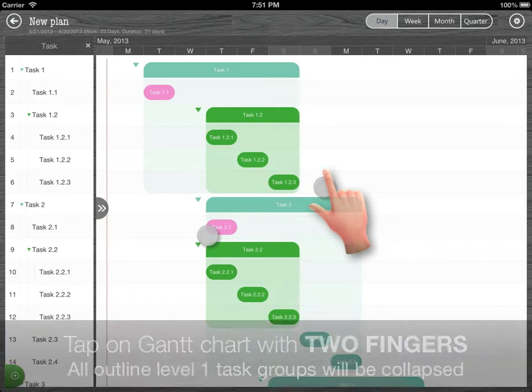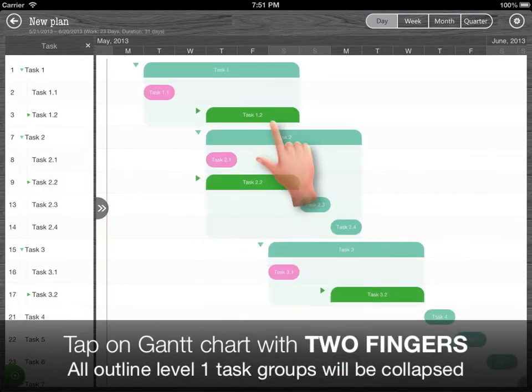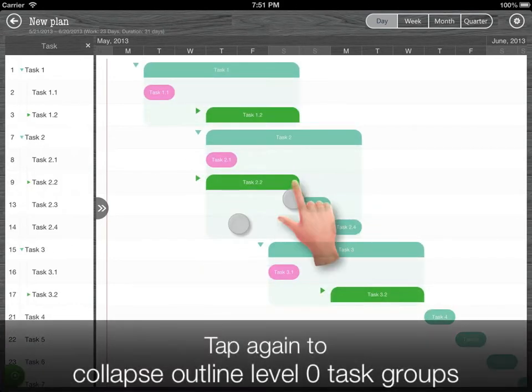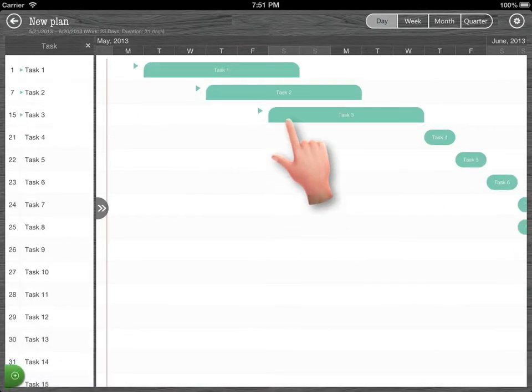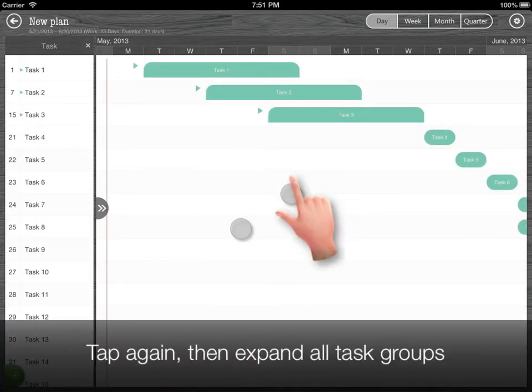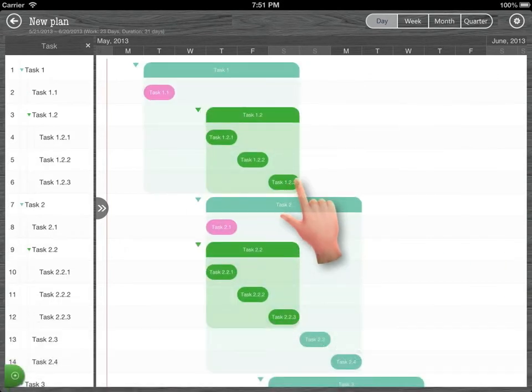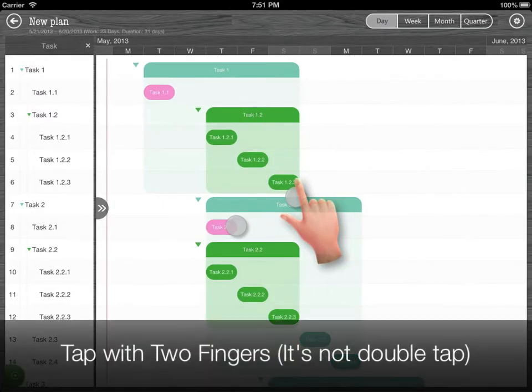Tap on the Gantt chart with two fingers, all outline level 1 groups will be collapsed. Tap again to collapse all outline 0 groups. Tap again to expand all task groups. Let's see it again.